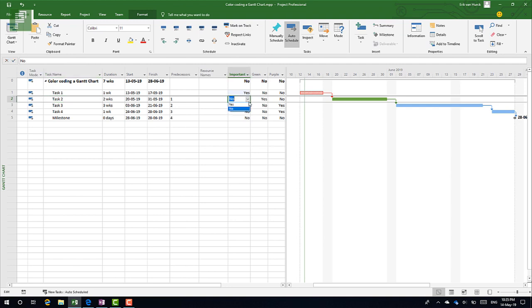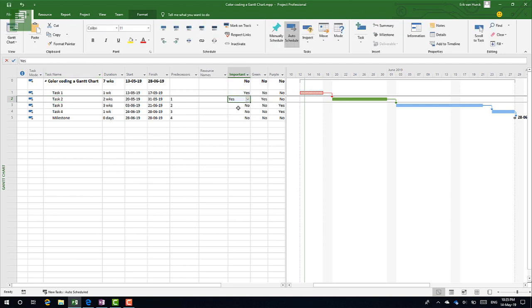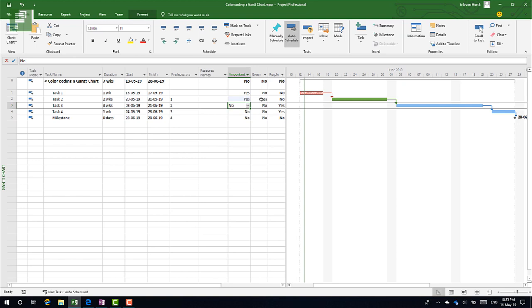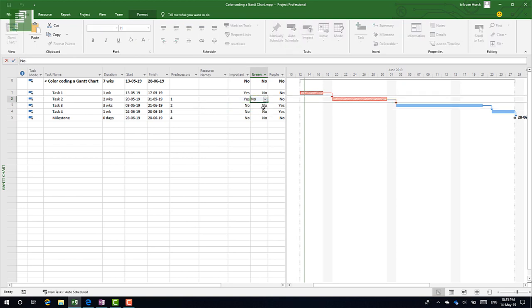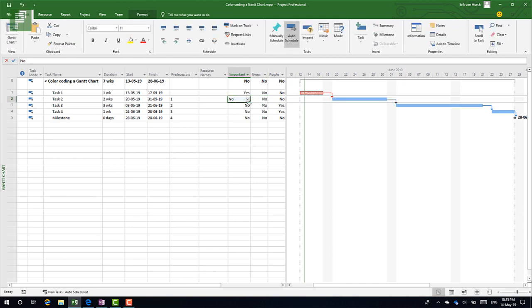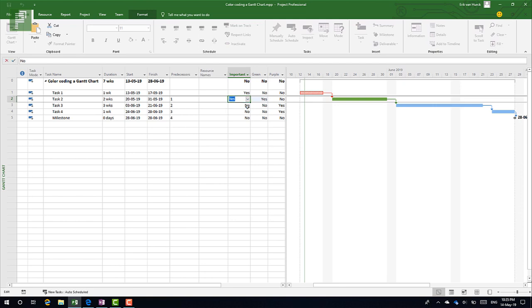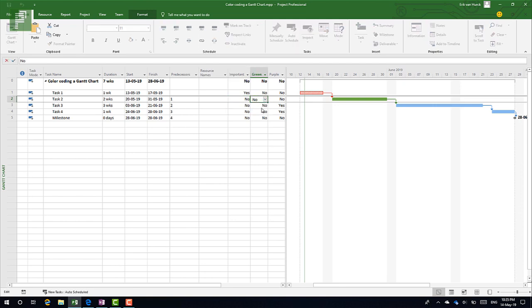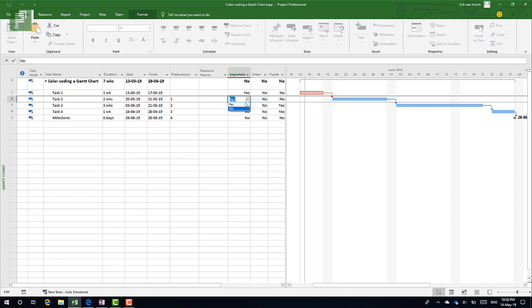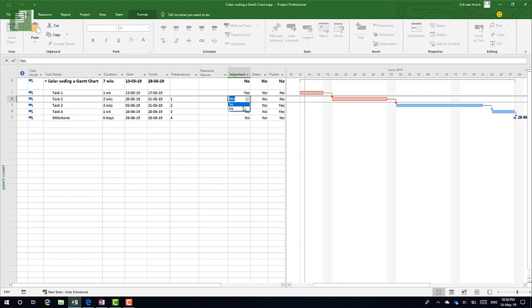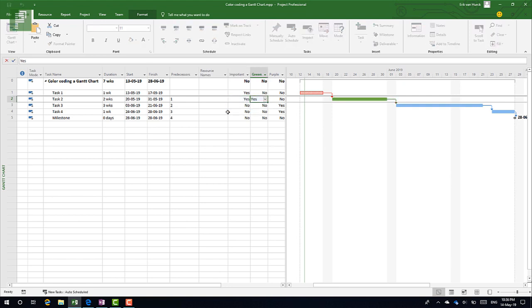Now what happens if I select this one to also be Yes? It doesn't change because it already got some formatting here. And let's see what happens. So it is actually the other way around where you want to have the Important one being the last one to select, because otherwise the green one will overrule. We see that happening here: both are Yes, and the Important one is overruled.